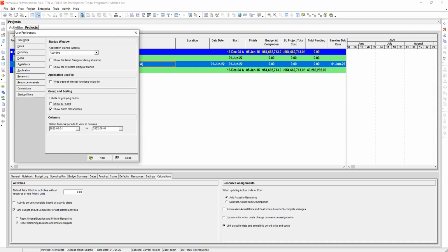Financial period is the period where performance or actuals are intended to be recorded or stored after a specific period progress update. That is to be able to track previous actual values, earned values, and planned values up to the data date or current date. This is also required for P6 store period performance feature.